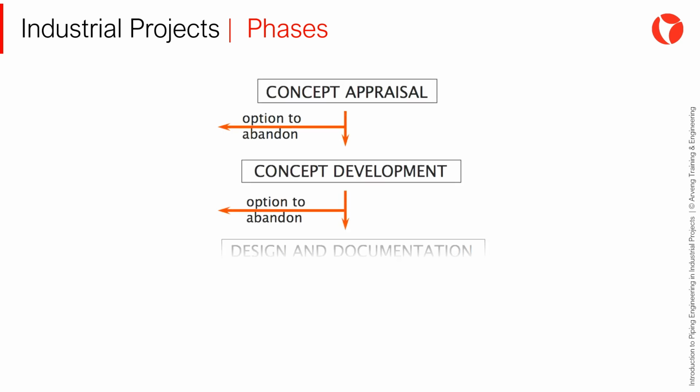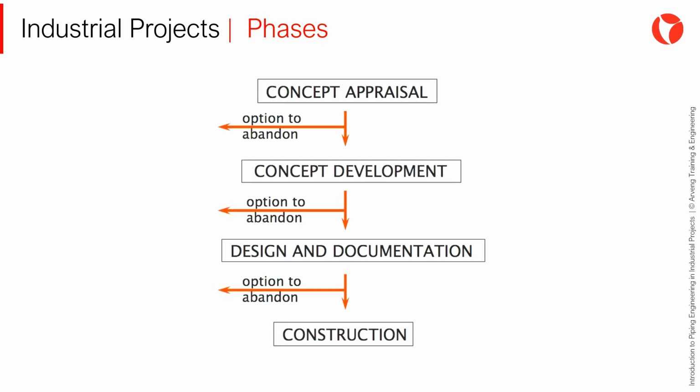As mentioned, industrial companies define formal phases for investment projects. This graph is just one possible example, as each company may have its own criteria for dividing projects into phases. Each one of these phases represents a specific portion of the investment, with increasing levels of detail in the project definition. This allows for the establishment of gates, where the executive team decides whether to continue or abandon the project.